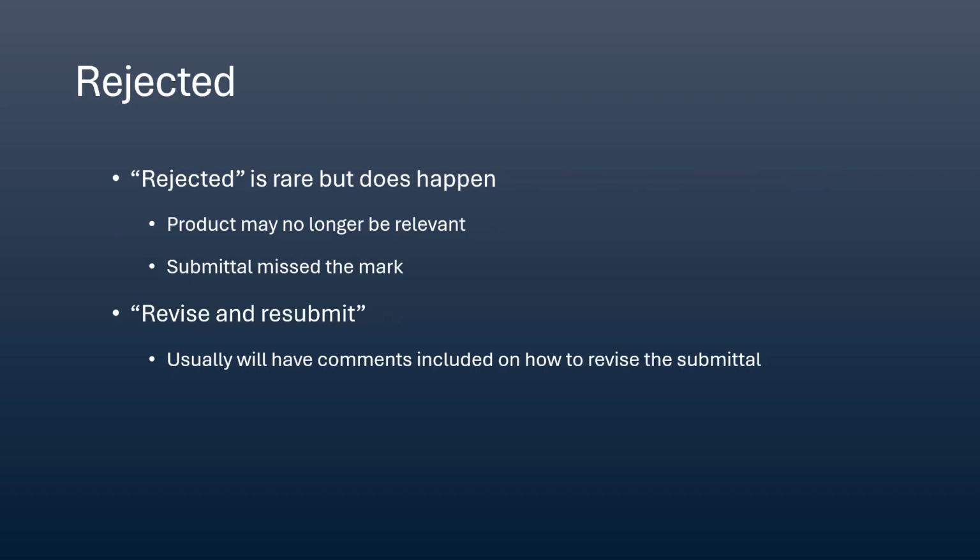So what happens if a submittal is rejected? Well, rejected is rare, but it does happen. I've seen it in some of the unique facets of construction that I've worked in. But the two main reasons that I've seen submittals just flat out be rejected: one is that the design has changed so much that that product is no longer relevant.